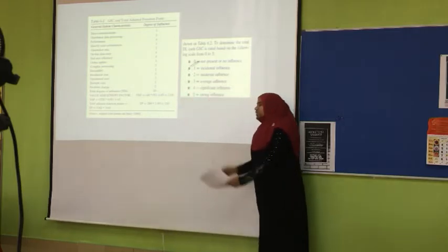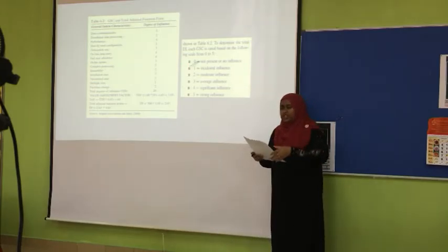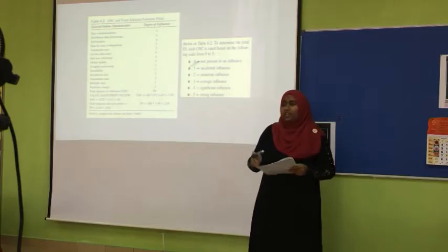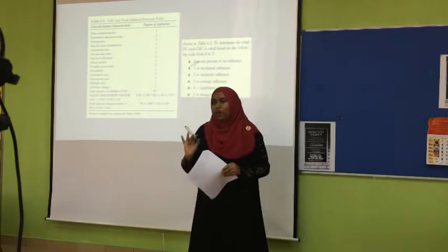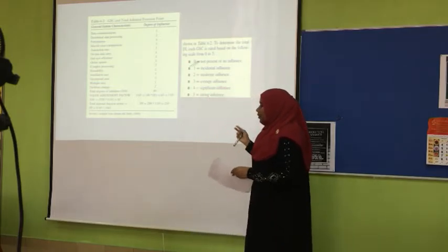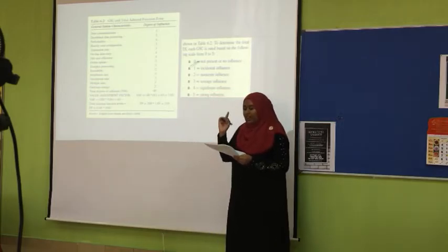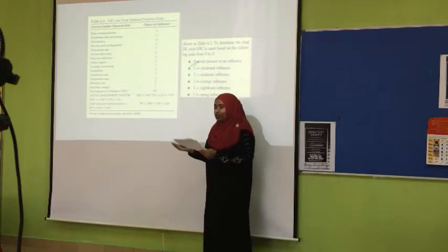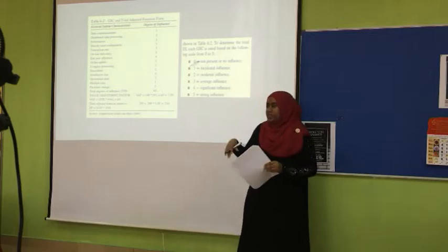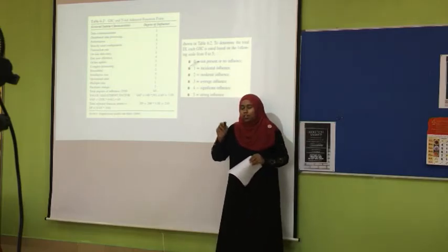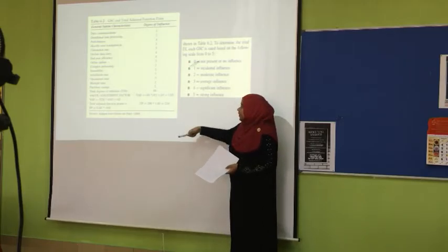Okay, this 210 will transform into a development estimate, where there are 2 approaches under this, which is using productivity and converting. Next will be converting FPA into an equivalent number of lines of code. For example, what I mean by this is this value here will be changed to 134,440 lines of code for machine learning, and for Visual Basic, it will be 6,090, because this depends on the language you use to code.